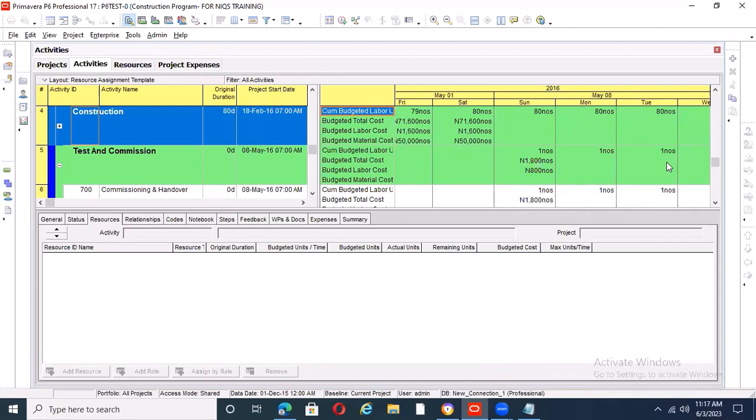And so these are some of the checks you put in place. You try to check to be sure that what you're doing is actually correct or not, right? You're looking at the schedule and whatever your spread is giving you, so that your spread will not be starting on a different day other than the date your schedule is starting. So once you have that done, then you can decide to export this to Excel to do your S-curve for your costs. Now, looking at this, you can also look at it in Primavera, that's the curves, but the curves are not really very interesting.